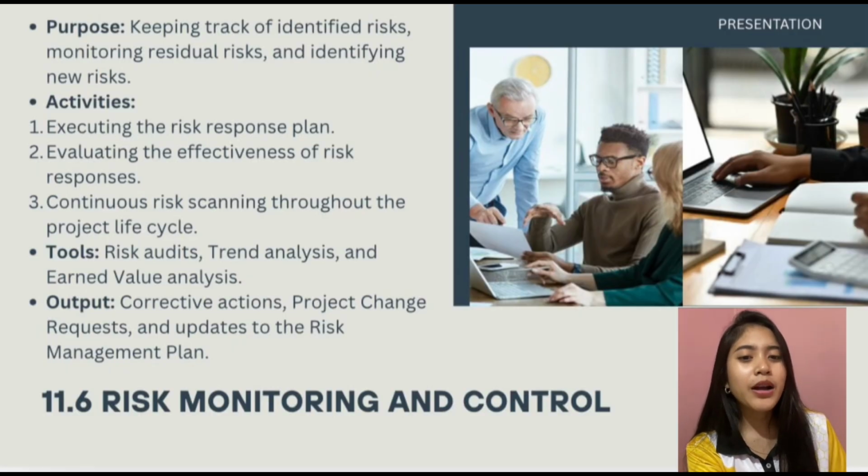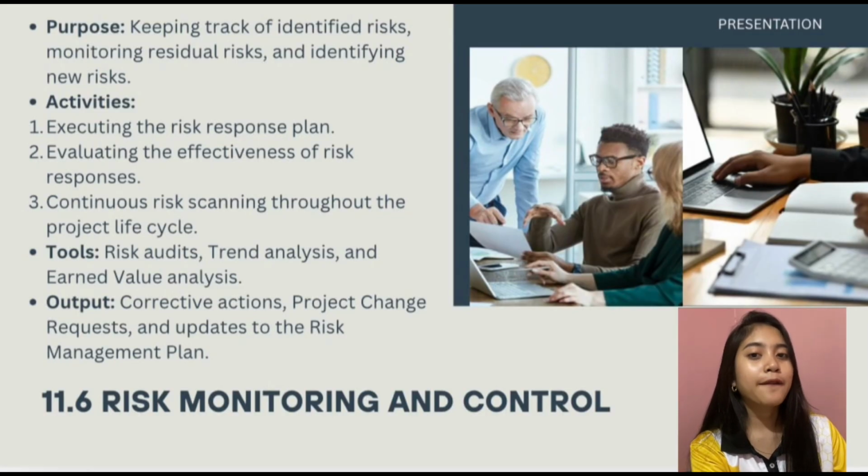There are several tools used in this process. One of them is the risk audit, which involves reviewing how well risk management is being followed and whether the planned responses are effective.